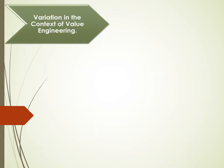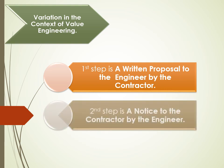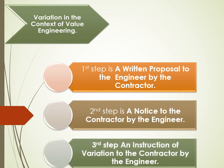Variation in the Context of Value Engineering. The first step is a Written Proposal to the Engineer by the Contractor. The proposal is to: Accelerate Completion, Reduce the Cost of the Project Through Its Lifetime, Improve Efficiency, and Provide Benefit to the Employer. The second step is a Notice to the Contractor by the Engineer. The third step is an Instruction of Variation to the Contractor by the Engineer.